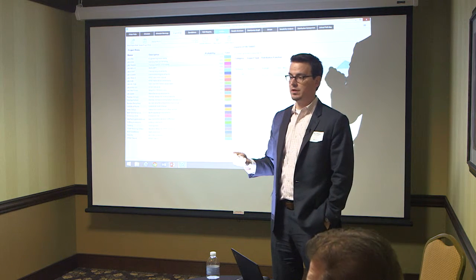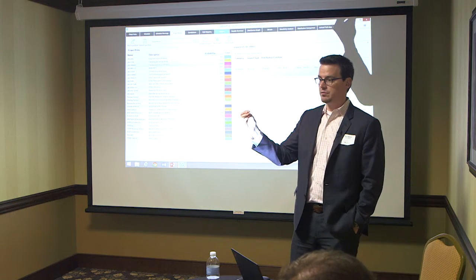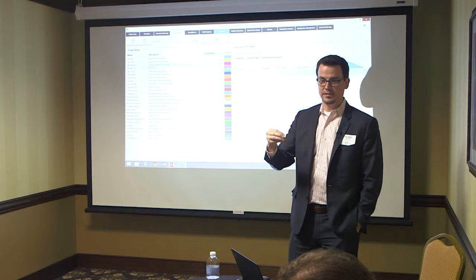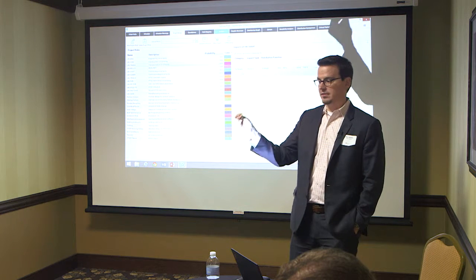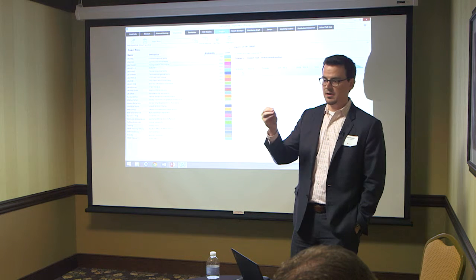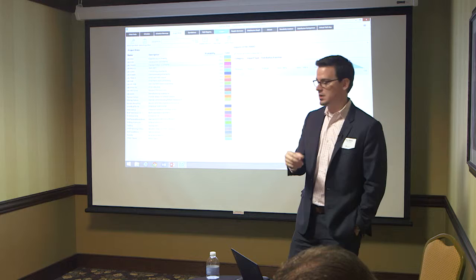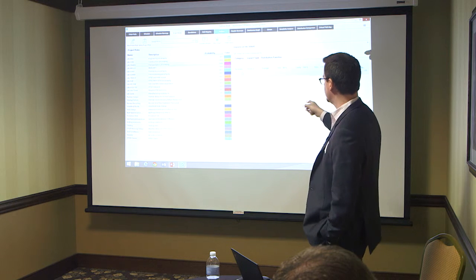It may be a quality risk. But what I really want to capture here is, for that quality risk, what is the schedule and cost impact? So if it doesn't pass QC or the testing, then I know I've got to have delays in my schedule and overhead costs to go back and fix that problem. That's what we want to capture here. So I can capture schedule and cost.